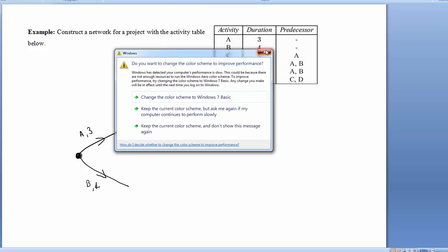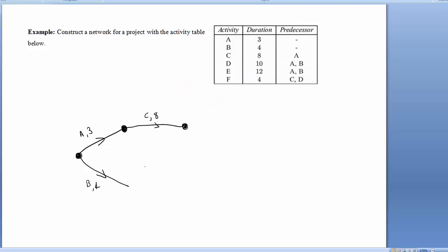So the way I do it is I'll put a vertice on B, and I'm going to indicate this task dependency by using this dummy connector. So we call this dummy, and it has 0 duration. Okay, now let's see what effect that has and why I did that.